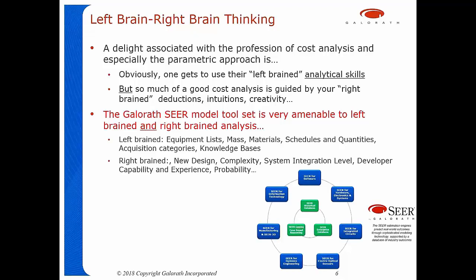Then the SEER models provide right-brained inputs also, things like the heritage or degree of new design that's going to be required, measures of the complexity of the hardware and software and manufacturing processes, the degree of difficulty expected in integration and test activities, the team's capability and experience, all these things that our right brain can deal with.